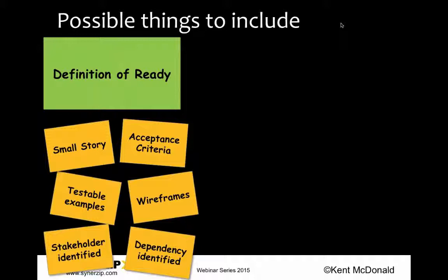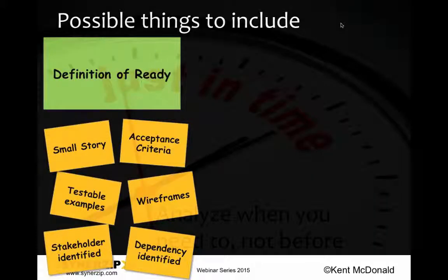So again, each team's definition of ready might be a little bit different. If you're in an enterprise type situation where you've got some outside teams that you rely on to do things, some of those types of activities like database changes and things like that might end up becoming part of your definition of ready, because you've got to get those things lined up before you can get in and moving things. But it's not something that's written in stone that can't be changed. It's just a general agreement amongst the team that says, as of right now, here are the things that we'd like to have in place in order to get started on a particular story.